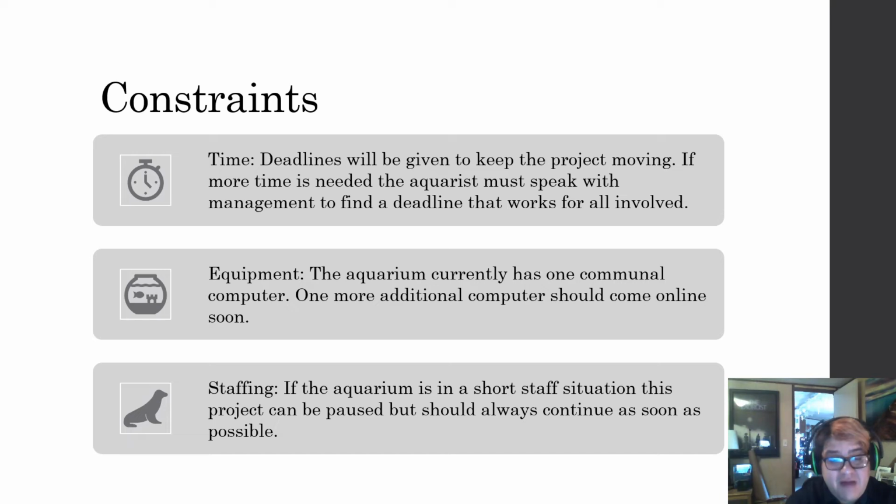And another thing that we did find was staffing. Currently inside of the aquarium, we are in and have been in a short staffing situation. So, in all honesty, this project has been paused for a short time until we could fill some vacant spots. Another thing with staffing is management turnover. So, right now, we're kind of in a big change time. So, what we're trying to do is hold off on this project, and then once we fill these vacant positions, everyone's comfortable in these positions, we're going to start pushing again to have these SOPs written.